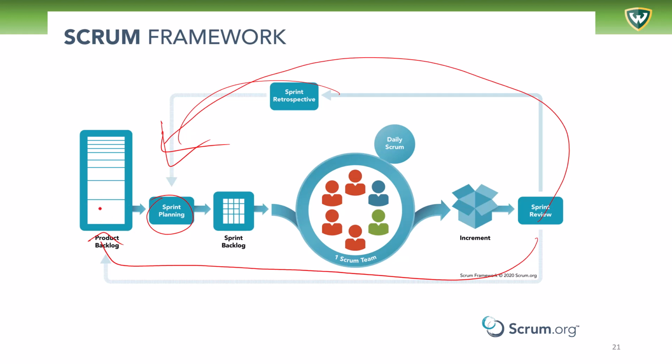which is just a list of the requirements, of the activities to be done. Now notice there's a sprint backlog here, and then there's a product backlog. So the whole product backlog is the whole list, and then the sprint backlog is the section of it that will be worked on in a sprint, which is a chunk or piece of activities set for a team to complete.